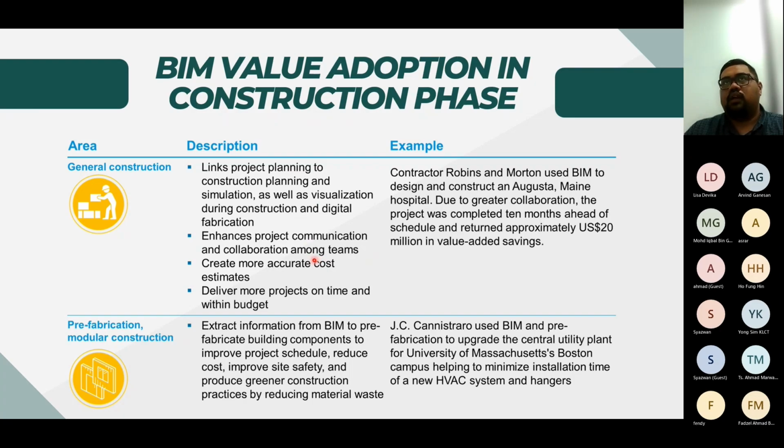So this means that the main contractor will dictate to the trade contractor to give their shop drawings based on the schedule, and then do the coordination every week, everything. And then for cost estimation, normally the trade contractor will update the costing and also the quantity.